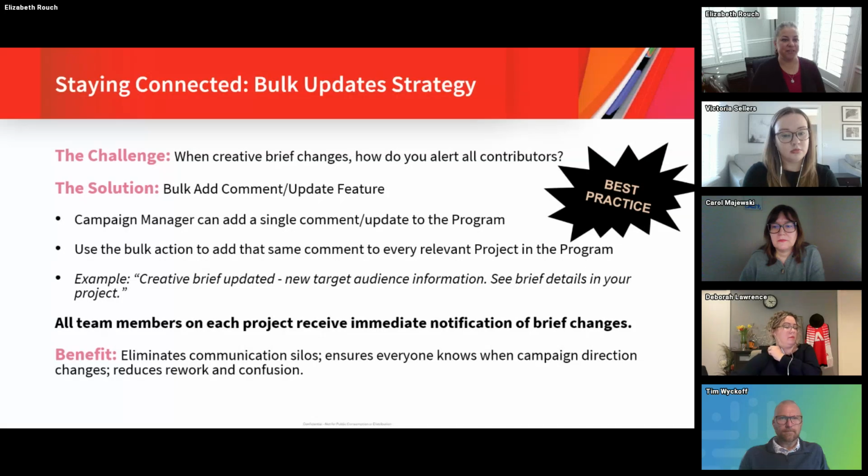Now, you might be thinking to yourself that it's unrealistic to expect the campaign contributors and stakeholders to notice exactly when something changes in the creative brief, and you're correct. Calculated fields will push the data, but they're not going to notify people. So that's where the best practice of comments and updates comes in. When the campaign manager updates the creative brief, they should still add a comment or update to the program explaining what changed. And additionally, they can add that information in a bulk update on every project in the program.